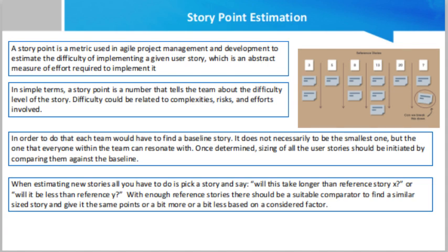Similarly, if a task is smaller than 1, it should be incorporated into another task. So this is very important. Then, friends, at this point within your sprint planning meeting, items in the product backlog can be prioritized and divided out amongst the team based on the team workload capacity.